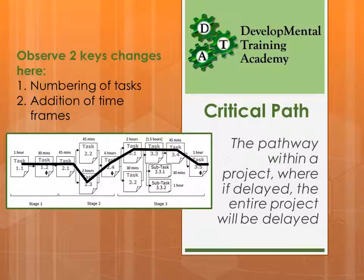There are two things different between a PERT chart and a critical path diagram. The first is that tasks have been numbered — each task has a number like 1.1, 1.2, 2.1, and we'll explain how to do that shortly. The second is that time frames have been added: 1 hour, 30 minutes, 45 minutes. There's a big black line across the middle, and that's what we call the critical path. Let's work through this process.